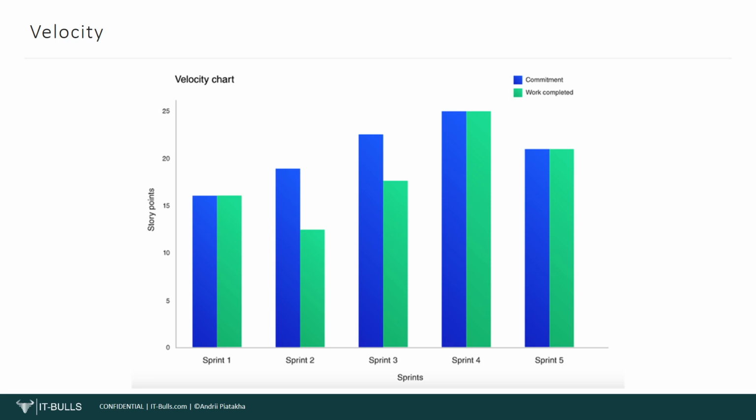If you are a project manager who has experience with Scrum methodology, you know that during sprint planning, it is better to know the team's capacity for the next sprint in order to be more accurate during the planning. There are different approaches to calculate team's capacity, but one of the approaches that I use is calculation of sprint capacity based on the average velocity in story points.